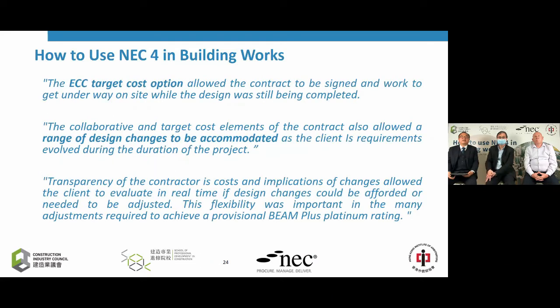Now, these are the comments from the participants in this project. The first one is that the ECC target cost option allowed the contract to be signed and work to get underway on site while the design was still being completed. I think this is the essence of using the ECI process.